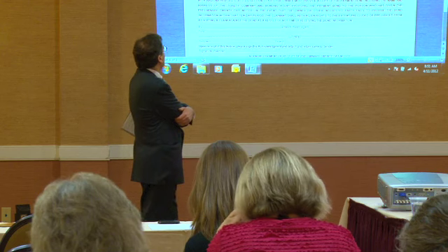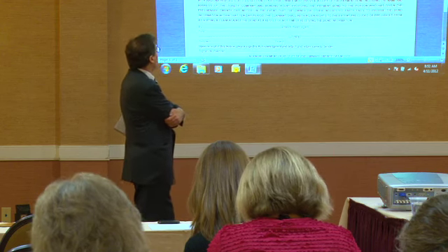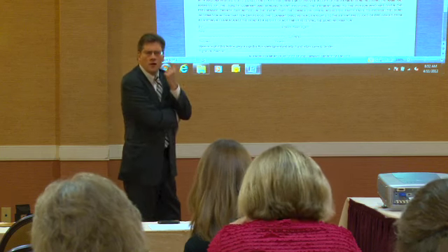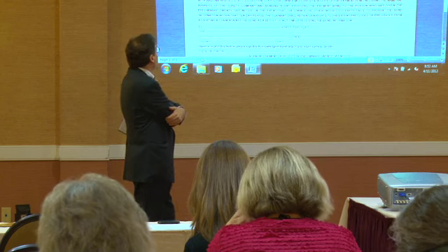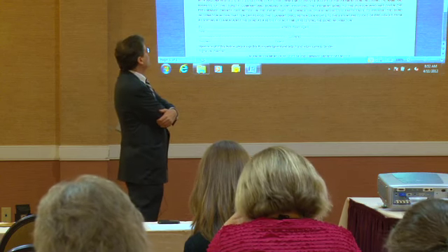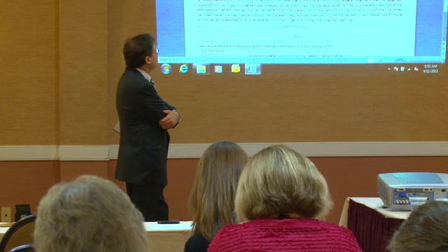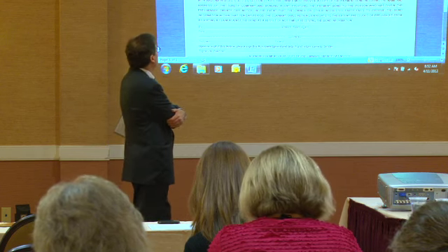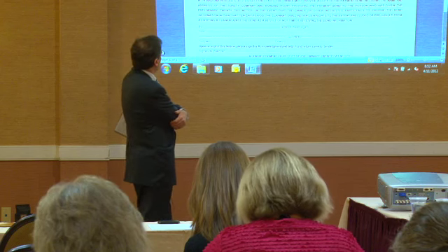You may wish to protect yourself against this consequence by either 1, requiring your contractor, remember, this is the owner who's reading this now, okay? This is the person's eyes you're looking through. Requiring your contractor to furnish a conditional waiver and release pursuant to Arizona Revised Statutes, Section 33-1008, subpoint D, paragraphs 1 and 3, signed by the person of the firm giving you this notice before you make payment to your contractor.